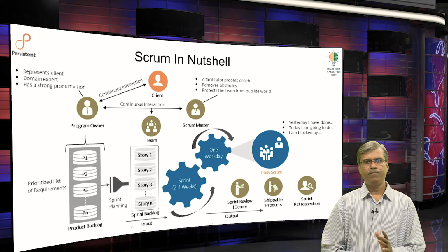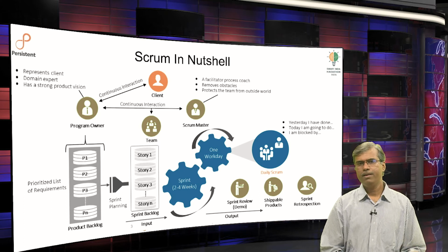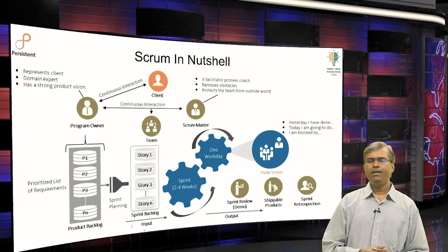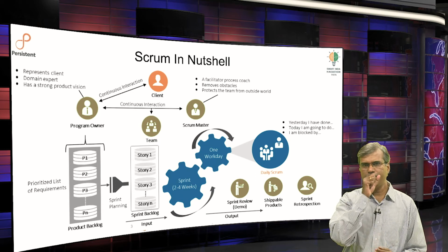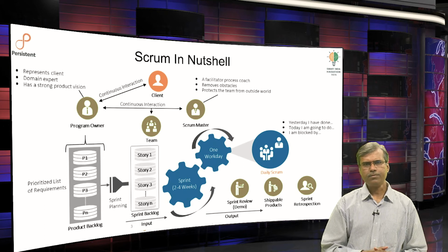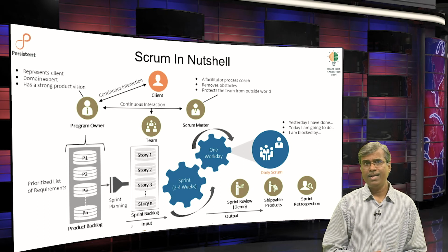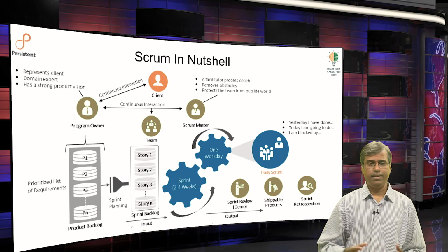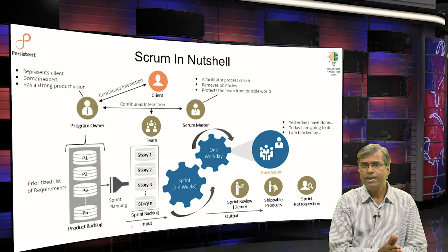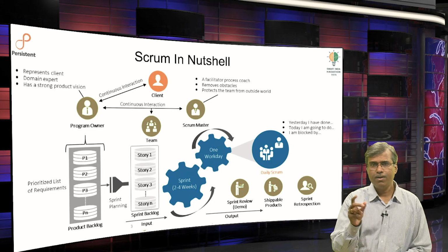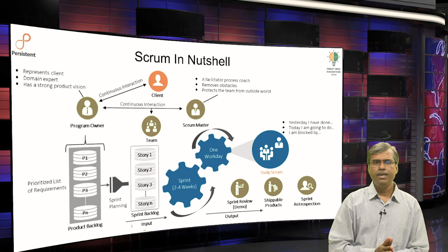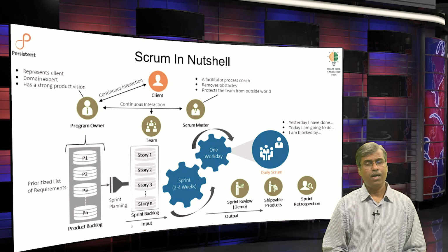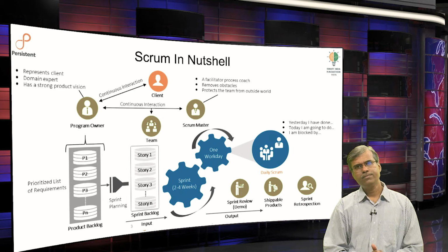Each of these numbers is picked up to represent the complexity of the story, right. If the requirement is simple enough, then the team members would assign a story point, let us say 5, or if the requirement is complex enough, the size could be as high as 21 or even more than that. And if a team cannot really identify the size, they would assign a number called infinity. That simply indicates that this story is too complex to estimate at this point of time. And how do you handle this situation? Simple.